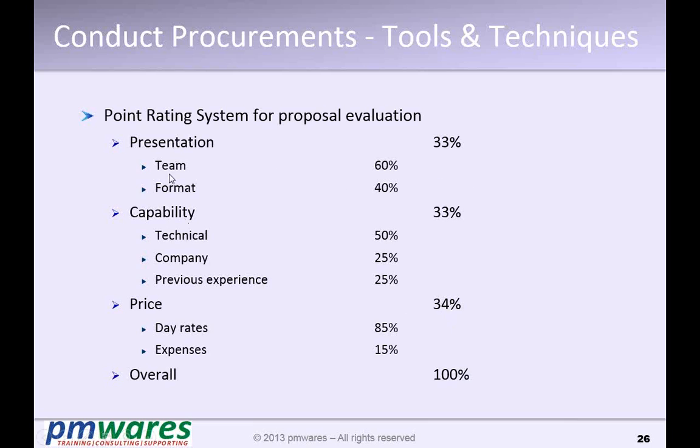Under that, you have also defined two sub-criteria which will help you come to this. And ultimately, based on this, you come out with the point rating, and normally you start evaluating the people who have a higher rating, even if they do not provide a complete solution. In that case, you call them and negotiate with them. Maybe you also see that the topmost person may not be the right choice because he may not have the full capability, and capability could be more important.